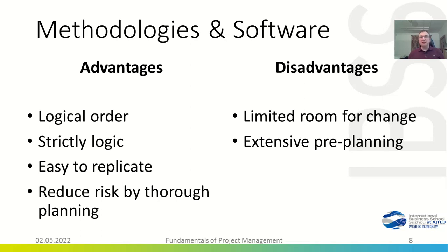Now, the advantage is obviously the logical and strict order. That makes it so easy to replicate, even if people do have very limited or no experience with project management at all. And the many planning items that we need to go through in order to develop a project plan enable us to reduce the risk. However, that also means a lot of work is going into the pre-planning of this project, and that leaves us very limited room for change.